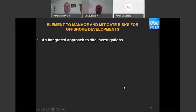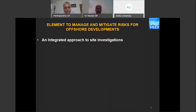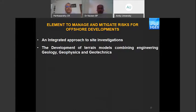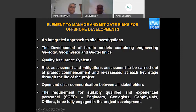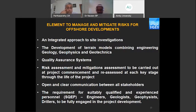The elements to manage and mitigate risk for offshore development start with the integrated approach to site investigation. Once you obtain the ground characteristics, identify the geo-hazards, and develop the ground model, design becomes straightforward. You develop terrain models combining geology, geophysics, and geotechnics. Quality assurance systems must be in place, along with risk assessment and mitigation carried out at project commencement and reassessed at each key stage. Open and clear communications between all stakeholders are essential, and it is critical to deploy skilled, qualified, and experienced persons — engineers, geologists, geophysicists, drillers, project managers, and construction managers — for project success.